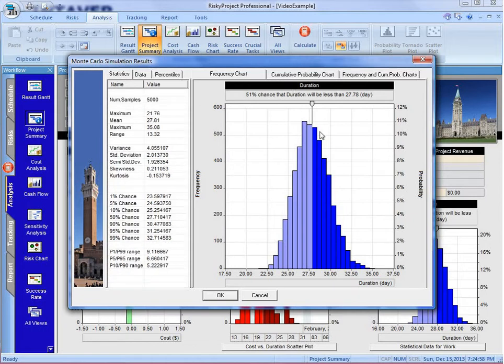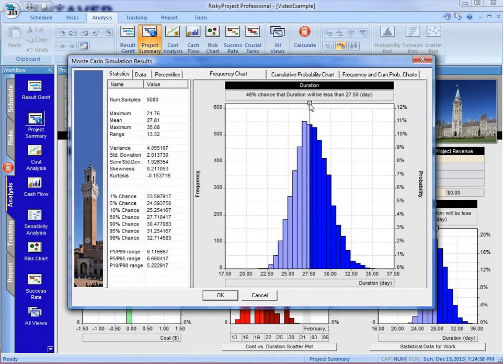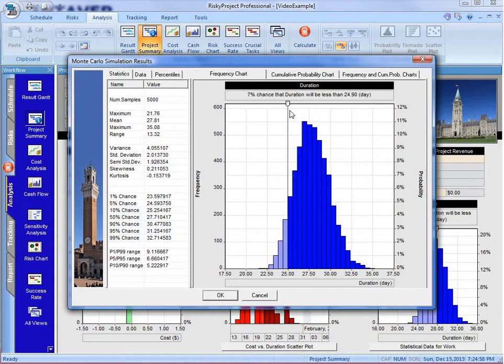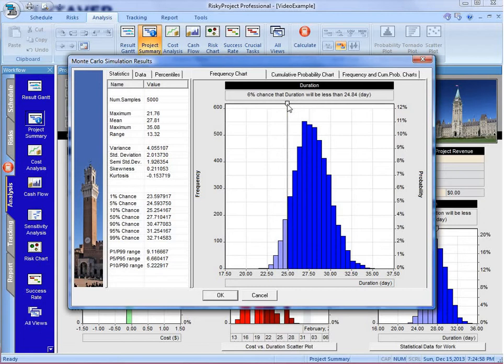Now, here we have a frequency chart. We can drag the slider across to see different values. It shows us that we have about a 6 percent chance of meeting the original target.